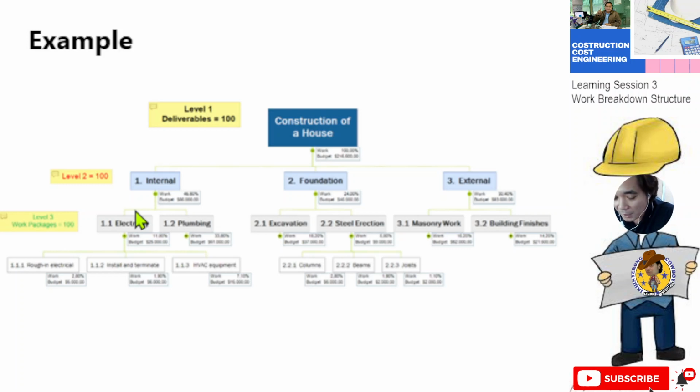So it depends on your way. But most companies first use detailed. Okay, this is to make sure of the accuracy. But if you are in a hurry, or if you have time constraints, you can use parametric or conceptual estimate.